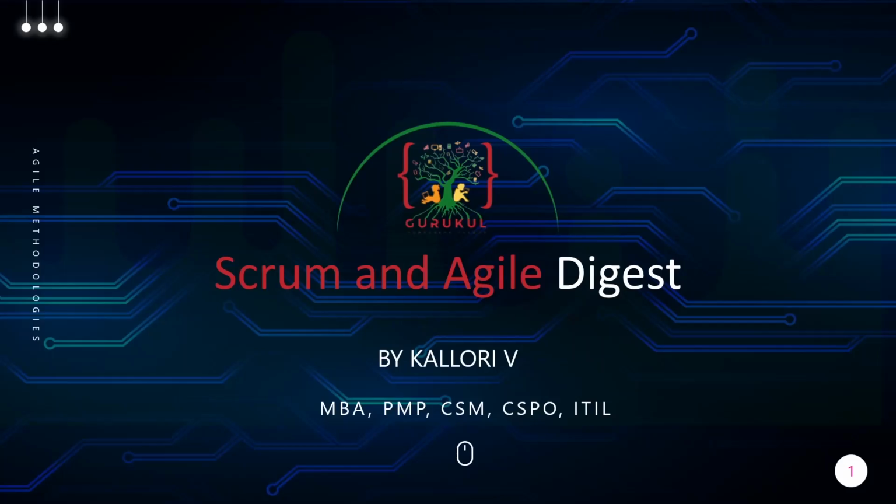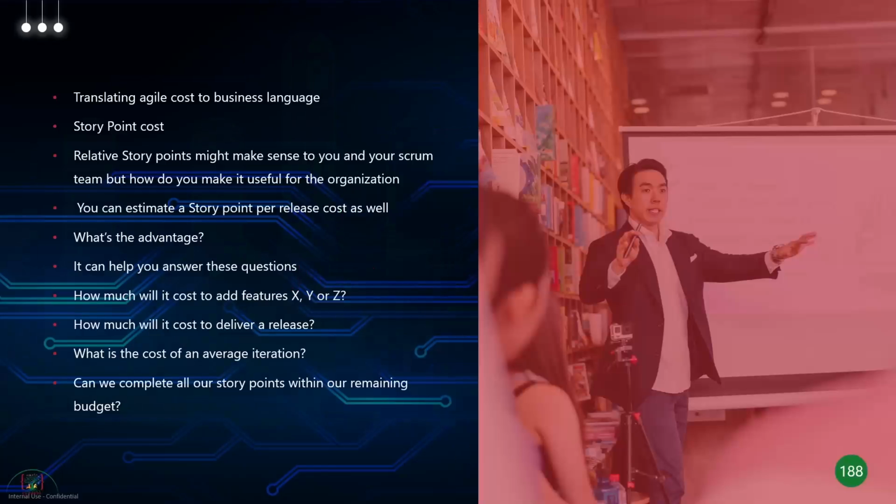Let's continue talking about Agile EVM. Now, to calculate Agile EVM, there are multiple calculations, right? You can have a planned percentage complete. You can have an actual percentage complete and planned value. You can look at the earned value. That's going to be the actual percentage complete times the budgeted completion. You can look at cost performance index, earned value by actual cost, schedule performance index, earned value by planned value, and estimate at completion, that's going to be planned iterations by schedule performance index.